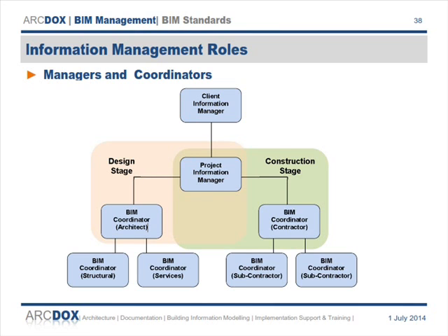So it's a role that passes from one person to the other. A little, I suppose, like PSDP and PSCS, where that role would pass from one person to the other. At design stage, you bring it to a point and then you hand it over and they develop it further on with the subcontractors. Okay, and then each party, each supplier, as they refer to them, whether they're a designer or a contractor, has to appoint someone as their BIM coordinator.